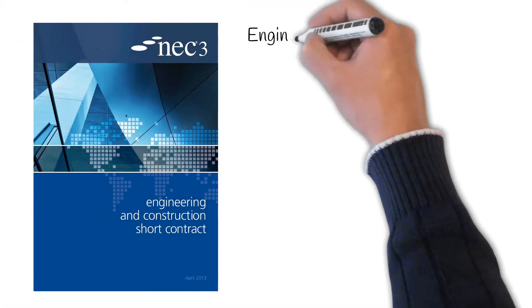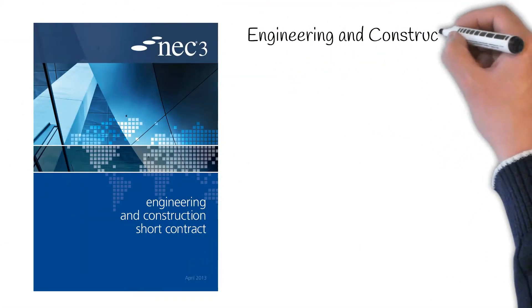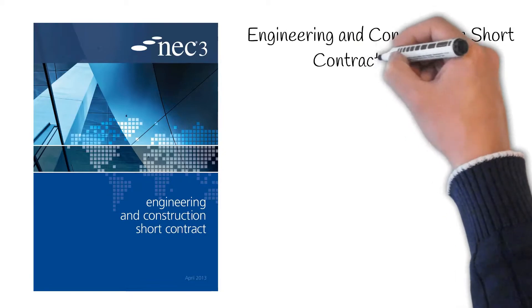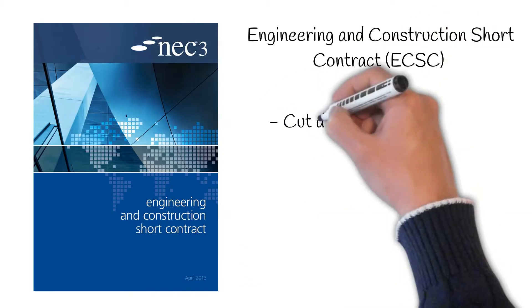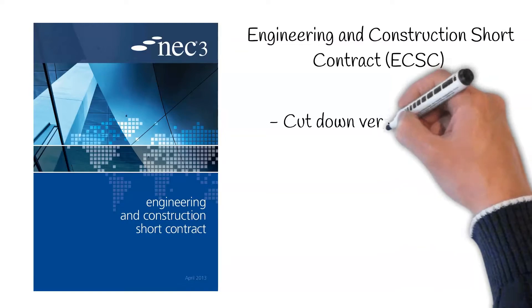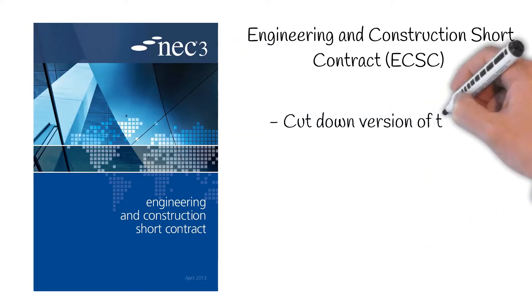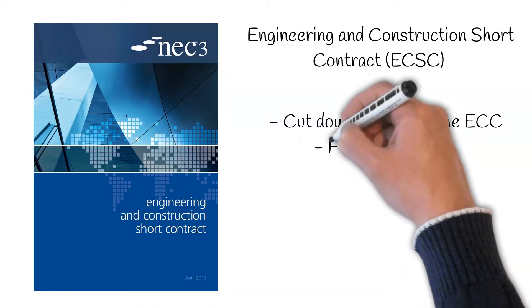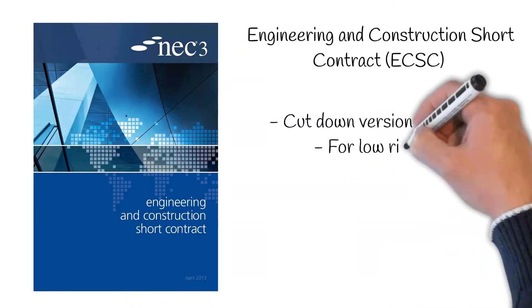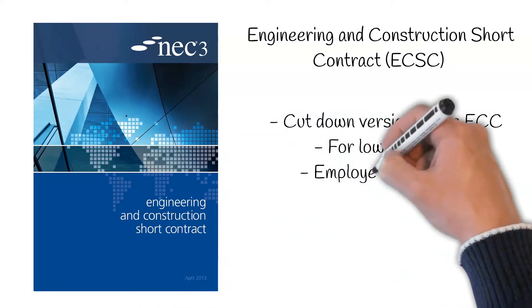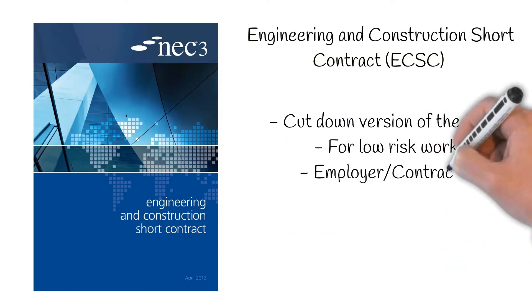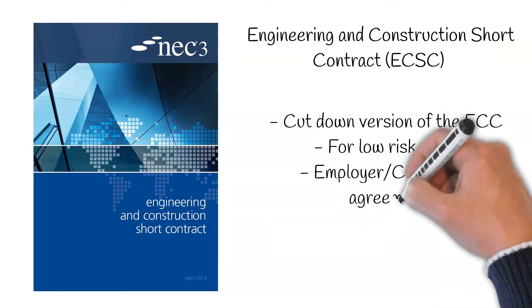Engineering and Construction Short Contract, or ECSC for short. This contract is a cut-down version of the ECC and is used when work being carried out is considered low-risk. Similar to the ECC, this is for an employer-contractor agreement.